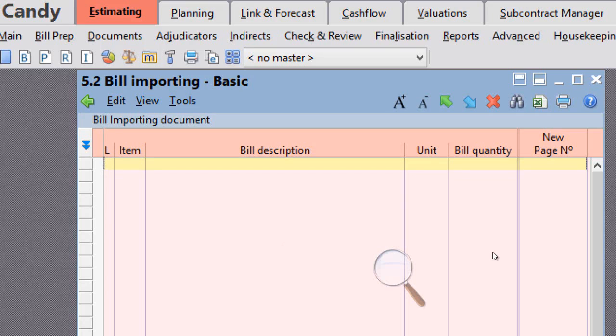So imagine an Excel sheet. This is our BOQ and there is only one worksheet, not multiple ones as we have in an Excel workbook file. So if you have 50 worksheets containing items in an Excel workbook file, in Candy you will have all the items in the 50 worksheets in one and only one sheet. Yes, you can divide this sheet in Candy into separate pages, but at the end it is only one sheet.